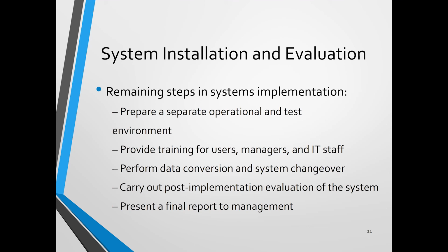What about December? Firstly, you have to set up the schedule properly. For example, if the New Year holiday this year is on the 30th of December, the 31st and the 1st of January, then the month end should be finished on the 29th of December.